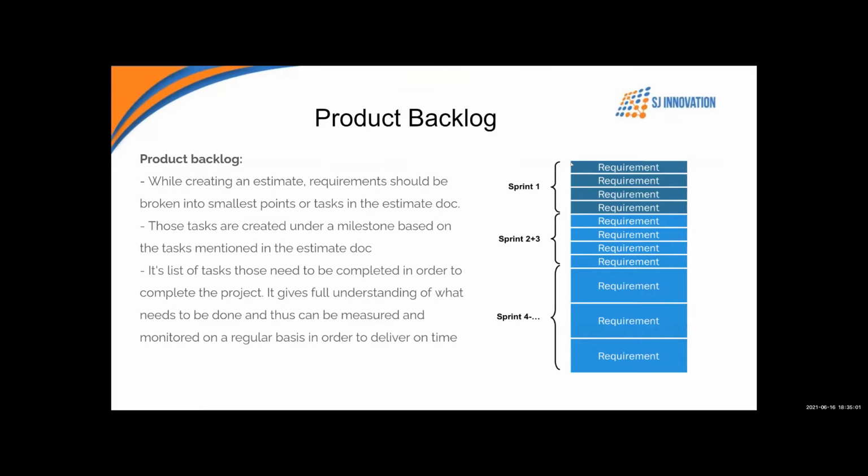I'm going to brief about product backlog, which is a very important thing. And if this is not taken carefully, entire things can go wrong. So the moment a proposal is signed by the client, we need to create the product backlog. This is where the entire list of tasks, all checkpoints, all deliverable items, we put in one single list based on the requirement, based on the complexity.